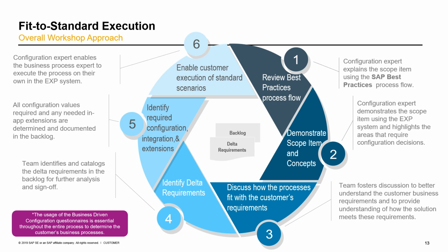As mentioned previously, we highly recommend the use of SAP Solution Manager, as this will be the most standard way to track and record any requirements. We also want to highlight that we want to record any Delta requirements related to configuration, integration, or extensibility in either SAP Solution Manager or the backlog tool.